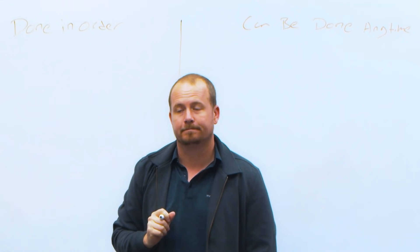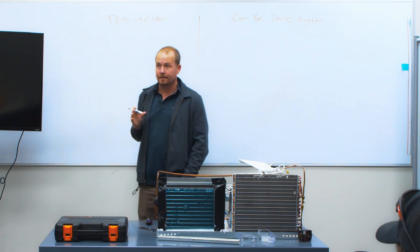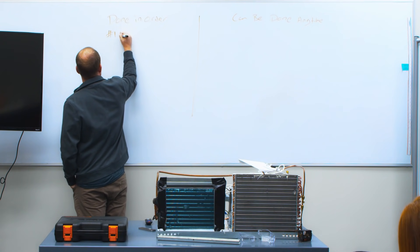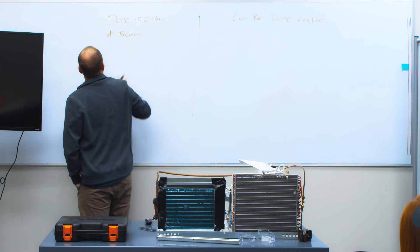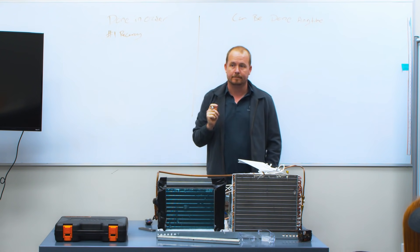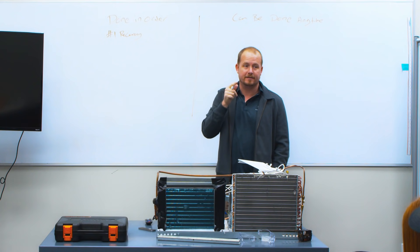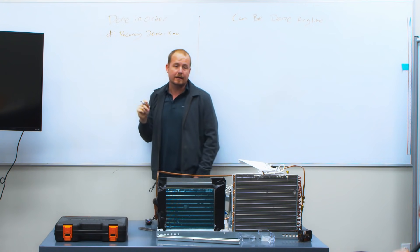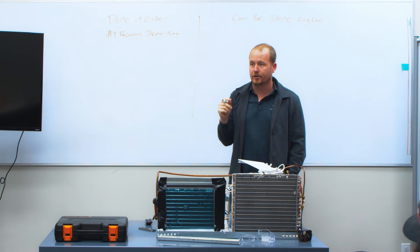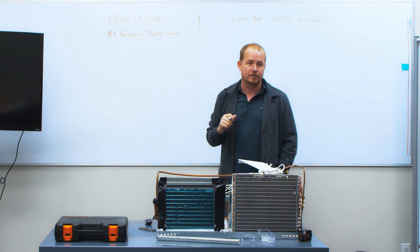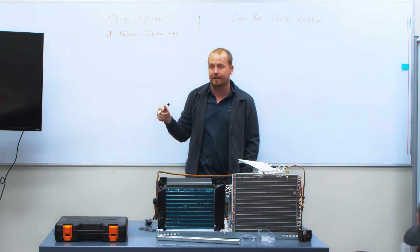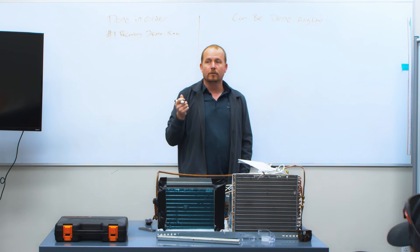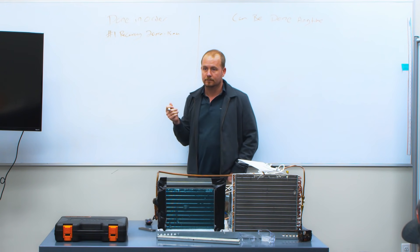What has to be done first when you're doing a change-out? Before you can demo, you have to recover. So number one is recovery. How long does recovery usually take — about 20 minutes? To do recovery properly on a typical residential system, you're pulling that refrigerant out in 20 minutes. But what if you could get it out in five minutes? You can do that if you're unwiring and demoing simultaneously — but what you can't do until you recover is cut the copper.